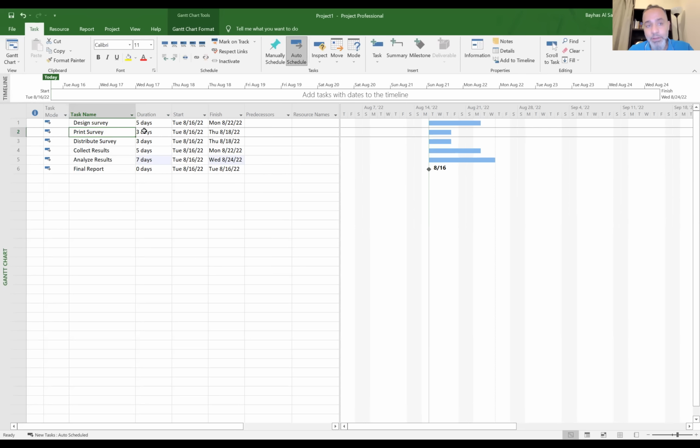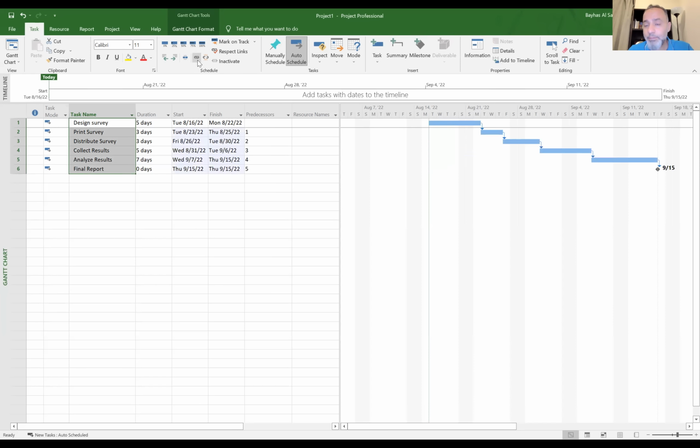And you have to finish the second activity in order to start the third activity, right? So basically, if you take all of the activities and you click on this button, which is the link, you get this. So the first activity, and when it is finished, the second activity, and when it is finished, the third activity, and so on.